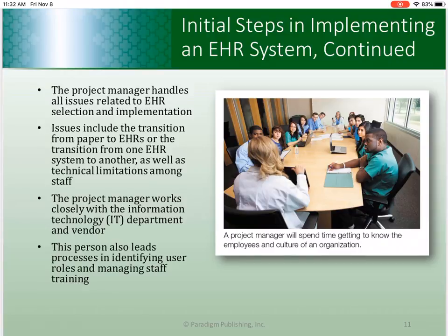He or she will work closely with the information technology department and the vendor implementation team. Lastly, your project manager, along with the vendor implementation team, must identify the roles of the healthcare facility employees, create a training schedule, and monitor the training progress of the staff.